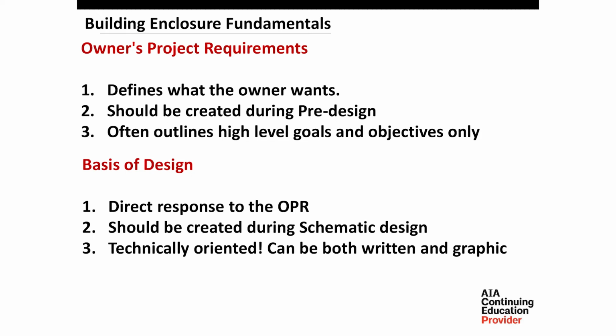And of course, basis of design, and these two things, as everyone knows, work together hand in hand throughout the entire project. The basis of design is a direct response to the OPR. It should be created during the schematic design. And again, in my experience, usually it is. I can't think of a time where it was established later on or too late in the process.